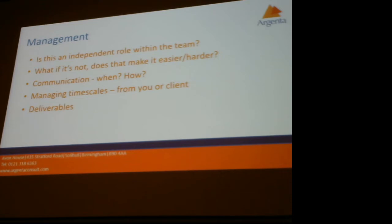I found that open communication channels, especially internal ones within companies, can make managing projects more challenging, because that constant availability leads to less formalised specification, and therefore people are more likely to ask for changes. Changes are going to happen, but they're going to be less thought through, and you have to constantly keep this dialogue going if there's not a formalised way of sitting down and communicating. If something gets changed over email, someone asks for a change, the developer makes that change, and doesn't realize it's not on Excel.